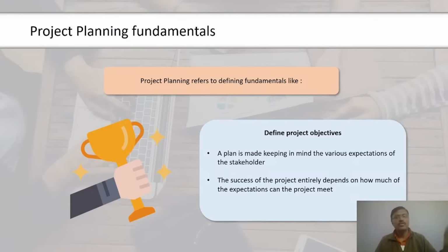Power failure, if I take an example as a risk for this training: what if power failed when I started the session? The entire session is gone. What if it goes off in the last 5 minutes of the session? Negligible impact. The occurrence is the same, power going off, but when it occurs, the proximity of occurrence also matters. So we may need to keep evaluating the risks throughout the project life cycle. Identify new risks, add them to the list, and then analyze them regularly throughout the project life cycle.